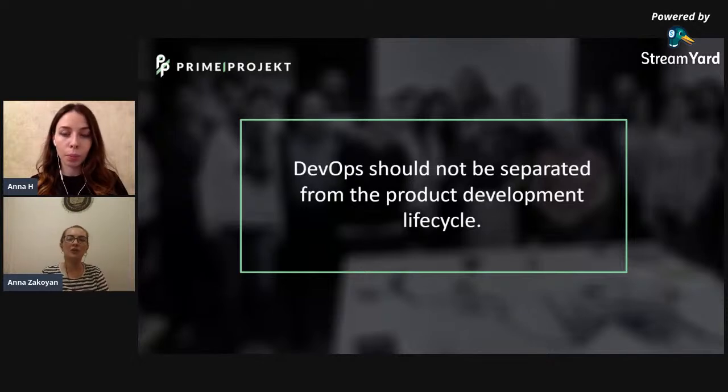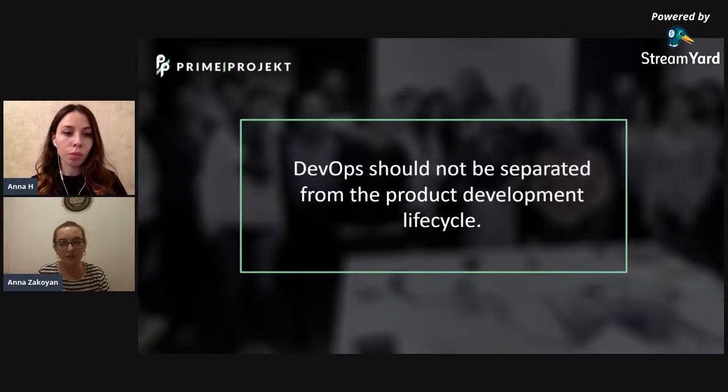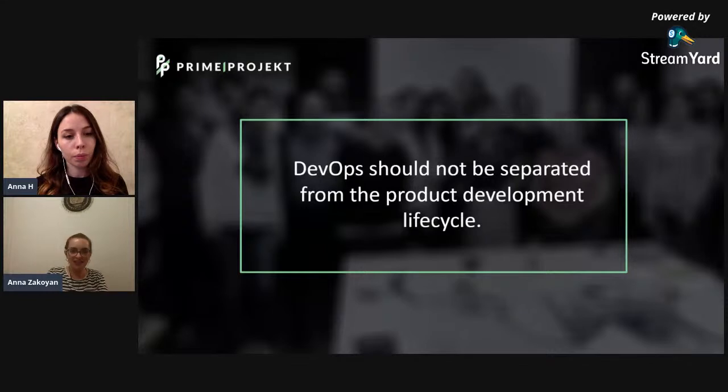Usually in most of the definitions of done that we have seen so far, you have the design, you have the documentation, you have implemented the code, it is reviewed, it might even have the unit tests written, it is tested by the QA and done. Okay, so you have to understand that DoD means that this feature is potentially releasable, or this group of features, or this epic, or these user stories.